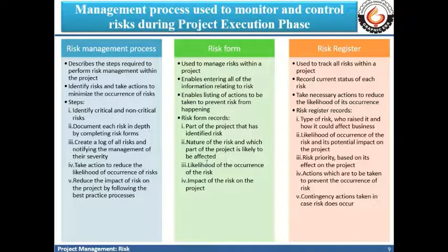As in the previous example we saw that NPV is multiplied by the probability, so we get the typical value. Similarly, for the risk, how much probability it has of happening, and how much impact it can have on a particular project, that is assessed.